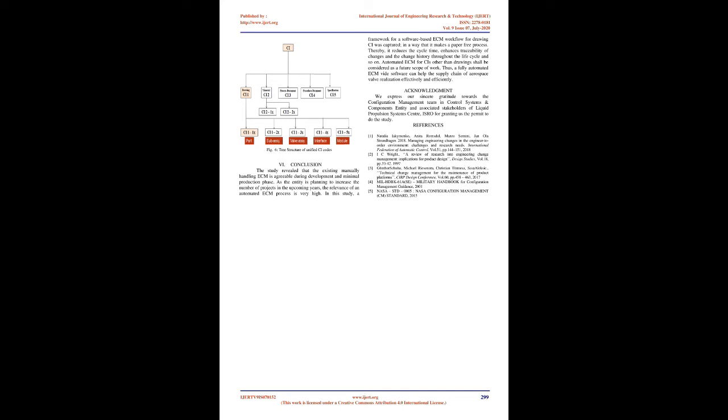C. Responsibility Assignment Matrix, RACI. The stakeholder roles and responsibilities were specifically depicted in a RACI matrix. In RACI, R stands for responsible, the one who executes the activity and gets the job done. A stands for accountable, the one who owns the quality and end result. C stands for consulted, the one whom others can consult for opinion and capturing knowledge, and I for informed, the one who needs to be kept up to date and needs information about process execution. Stakeholder identities were listed in the columns and the tasks involved in each milestone were listed in the rows.